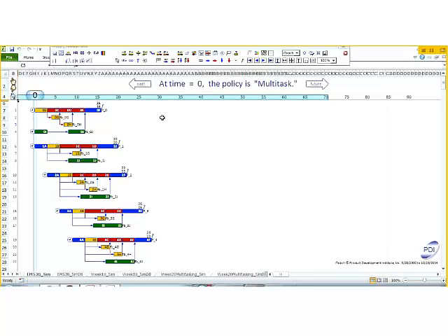How do I decide how much work is done for each task? In a typical workshop, we'll spin a spinner. That's how much work the resource put out that week, and we'll split that across all active tasks. Now, because I'm not good at doing arithmetic quickly under pressure, I'm going to do a simpler approach. I'm just going to say every week there's an output of 5 days, and I'm going to apply that across the project. So we're going to look at this simulation without variation. It makes it a little more straightforward. So every week there's going to be 5 days of work, and it's just going to be divided across the active tasks.